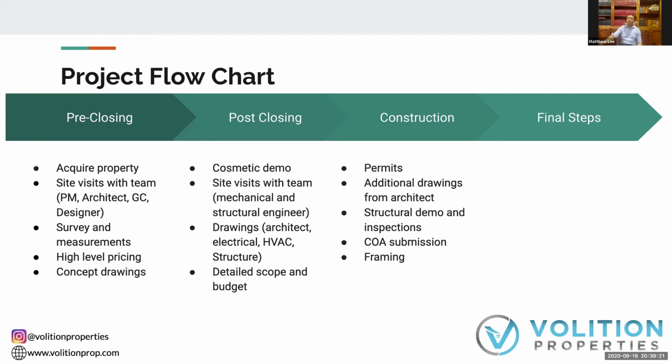They'll base it on a whole bunch of things. Is it in line with the neighborhood, right? Or is what you're asking for in terms of this extra 500 square feet outrageous? Is every house on that street really, really tiny, but you're the only one building this massive house, right? So it's almost like case law. They'll look at the cases in the neighborhood to see whether or not the variances that you're asking for are in line and reasonable. Part of our experience, which is valuable, is we are familiar with the neighborhoods and what you can and cannot get away with.